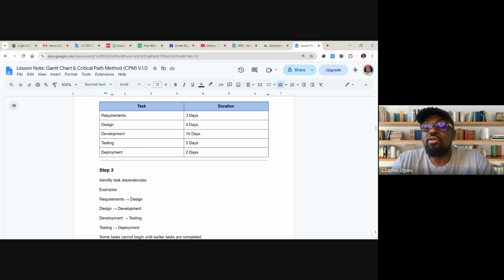While the RAID is going on, as a matter of fact, we can do requirement gathering the same day the team is doing the RAID. Somebody is doing the risk analysis and somebody is starting requirement gathering at the same time. For instance, we'll have somebody called the risk manager here. The risk manager can start his own work while the business analyst is doing requirement analysis. So such activities can work hand in hand, not depending on each other.